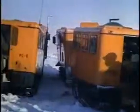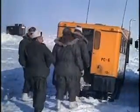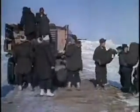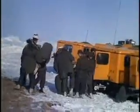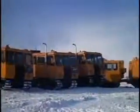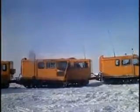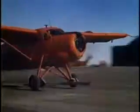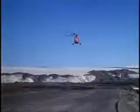At the same time, we used another type of smaller vehicle to transport an advance party. These polecats would average 10 miles an hour and make the trip in little more than half a day. A convoy of polecats, each section carrying 6 men, was called a light swing. We also used light aircraft. Throughout the operation, these flights brought in key personnel, special cargoes, and mail. We couldn't forget anything. This wasn't country in which to turn around and go back.